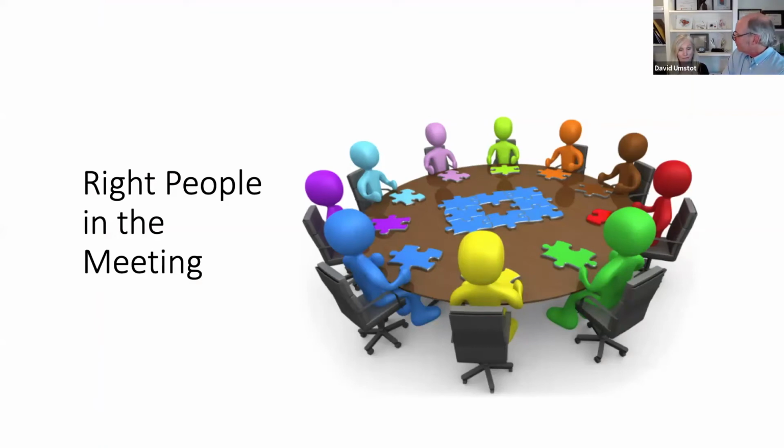We've been on integrated form of agreement projects where we didn't have the right people in the room, or the people in the room weren't the right people, in the sense that they didn't feel they had the authority to act and make decisions on behalf of their company because they were new to the company. And that created all kinds of problems. We've had Last Planner sessions where people in the room were just told by their company to show up, and they really weren't familiar with the project and really wouldn't commit to any milestones or to any of the plan.